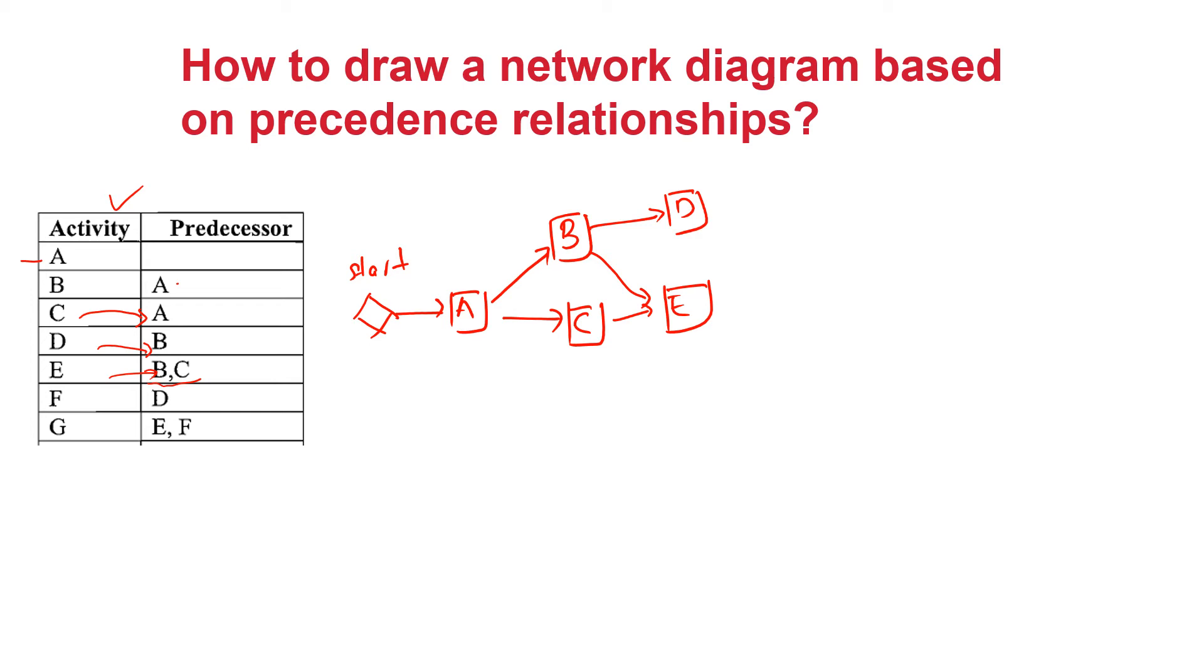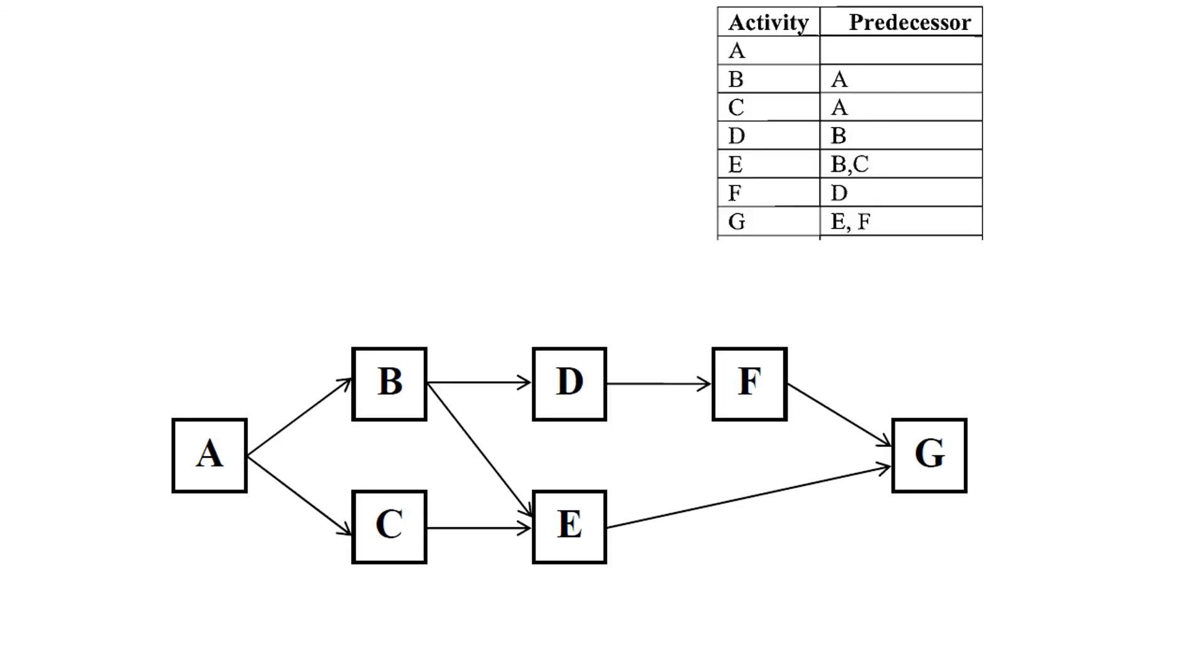And the second last is activity F which depends on completion of activity D, and activity G which is the last activity and dependent upon completion of activity D, E and F. So this completes the network diagram and if you want you could have a milestone activity towards the end indicating end of this project. So this is how your final solution may look like.